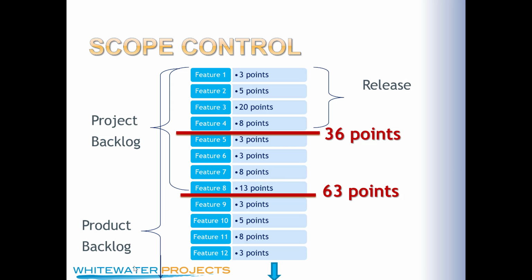And the way you control this is very simple. Someone comes and they want to add scope to your project. They want to add another 8-point story to the current release. That's fine. You have a couple of options. We can either change our estimated release date. Based on our current velocity, our release date is X. If you add an 8-point story, you take the velocity and calculate the amount of time that would add, then it would be Y. This is our new release date.